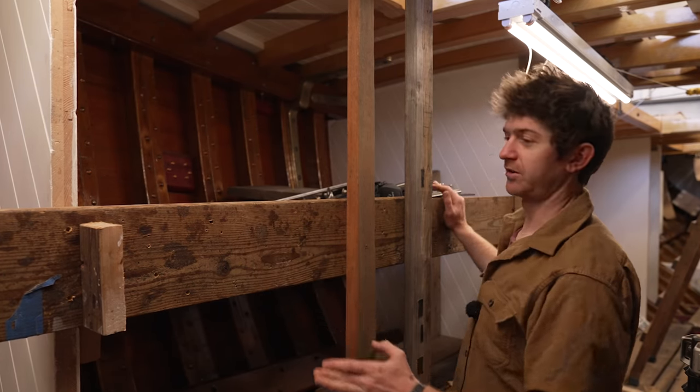In the interior, the biggest challenge for me is the systems, because I don't really come from a systems background, but I've been spending a lot of time trying to design the systems for the boat, because I want to get them planned and in the boat before we put too much cabinetry in. And so there's water systems: fresh water, raw water, grey water, black water, that all have their separate plumbing systems. There is, of course, a diesel system with two tanks and filters and so on.